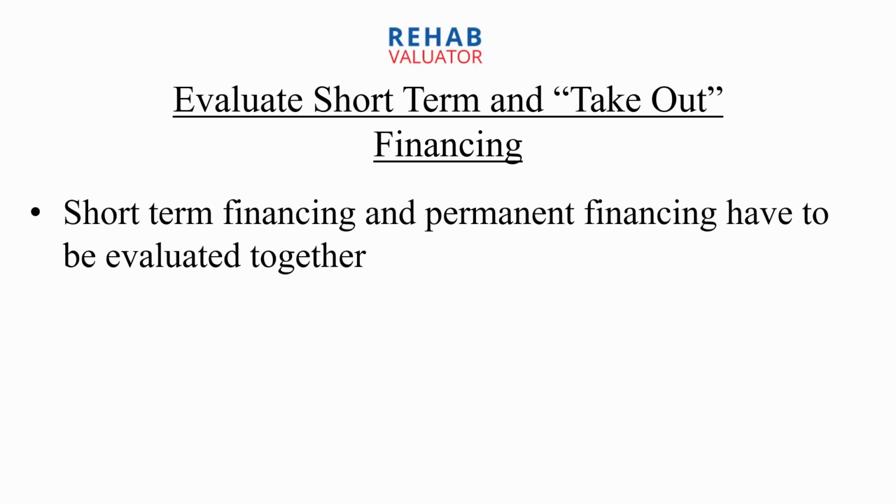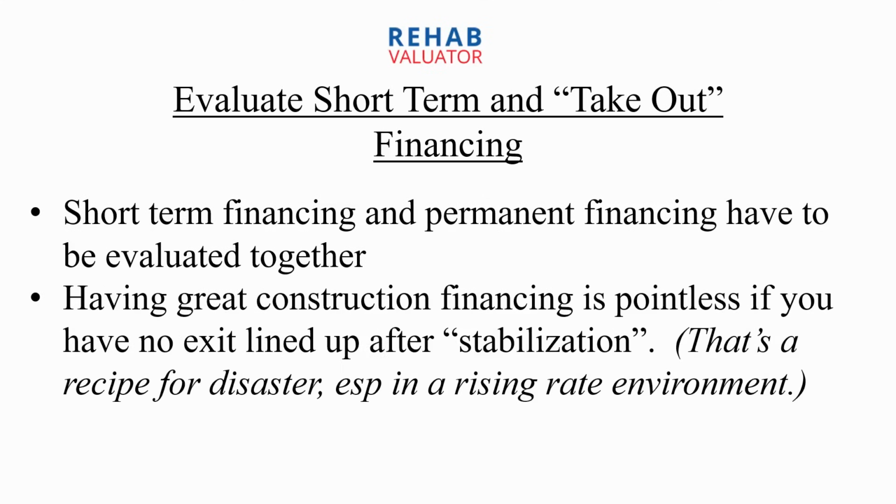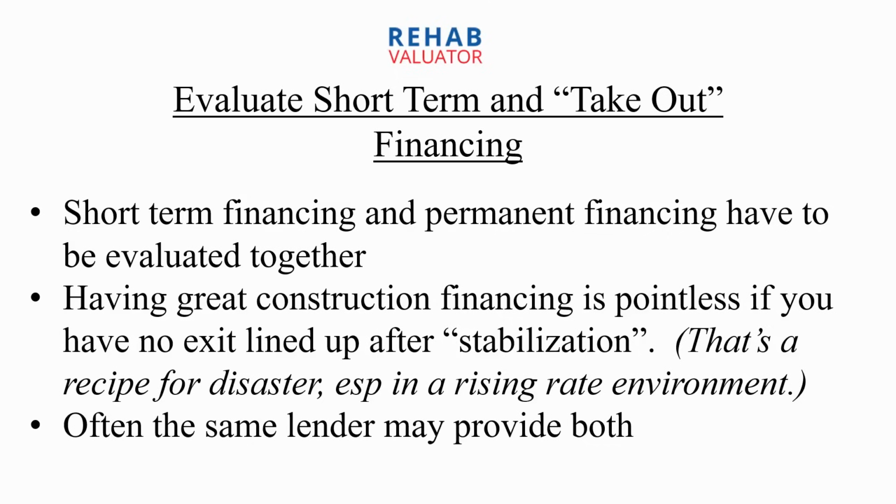So I won't go into a ton of detail here, but I will say this: short-term financing and permanent financing have to be evaluated together. If you've got great construction financing, that's great, but it's pointless if you have no exit lined up to convert your loan to a permanent loan, or if your permanent financing is too expensive and the deal won't cash flow. That's a recipe for disaster, especially in a rising rate environment. So let's continue our analysis, and I'll show you exactly how to evaluate your short-term and permanent financing.